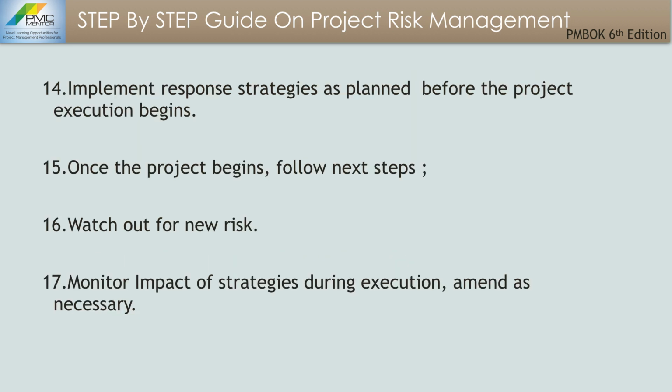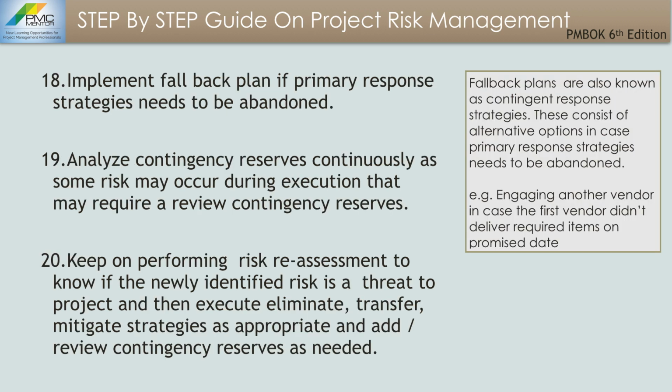Number 14, you should implement these response strategies as planned before the project execution begins. It's very important from exam standpoint because we're looking for a proactive approach to prevent any issues from happening. Number 15, once the project begins, you should follow these steps. Watch out for new risk, monitor impact of strategies during execution, amend these strategies as necessary.